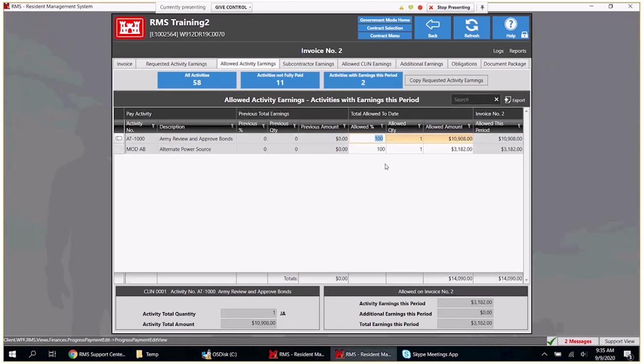It's just very important that any changes get documented so that down the line there's no disagreement on, well, hey, this guy kept changing what I asked for. You can document, hey, the agreed upon percentage from the pencil copy was this. 100% was requested in error. Maybe document that you called them. Very important that you put that in the ENG 93 remarks.